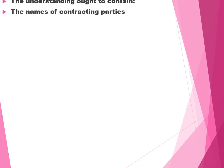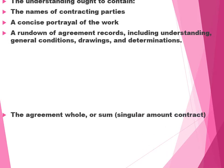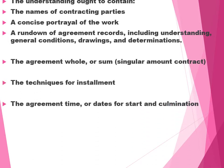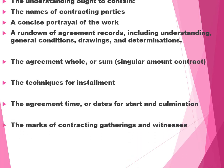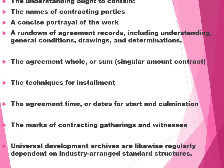The agreement ought to contain: names of contracting parties, a concise description of the work, a list of agreement records including agreement, general conditions, drawings and specifications, the agreement sum or lump sum contracting case, the techniques for installments, agreement time, date of start and date of completion, marks of the contract parties and witnesses. Universal development archives regularly depend upon industry-oriented standard structures.